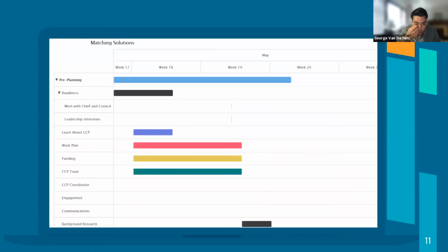And then this is an example of a report that you can generate. There are several different types. This is what you would call a Gantt chart, but really it is a schedule of the different steps of the planning process. You have the option to enter in the start and end dates. Maybe they're finished and you know exactly when you were doing it, or you have future predicted dates that you can enter. And then when you create this report, it'll show you